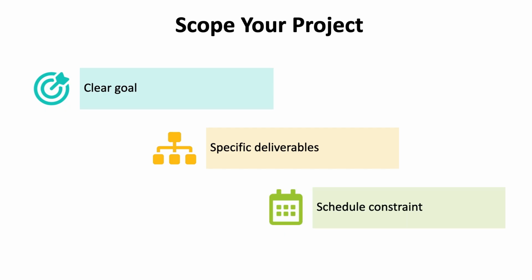Essentially, all research projects are conducted under constraints. Since your project needs to be completed in less than a semester, you will be operating under a very tight schedule constraint. The first part of the semester will be taken up with learning about double stars and planning your project. The last part of the seminar will be taken up with writing, reviewing, and refining your paper, and preparing for and giving a public presentation. This only leaves a few weeks to actually conduct your research.